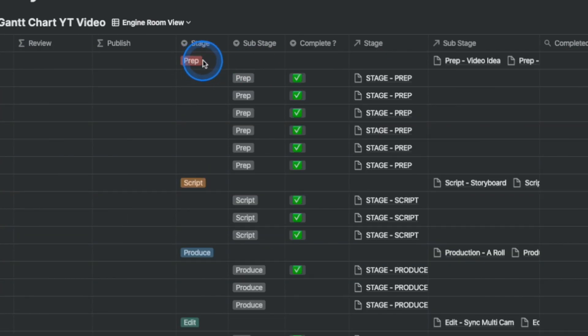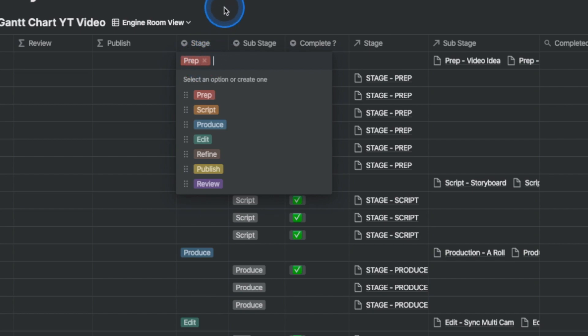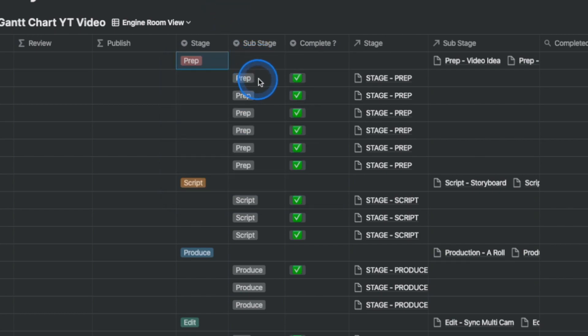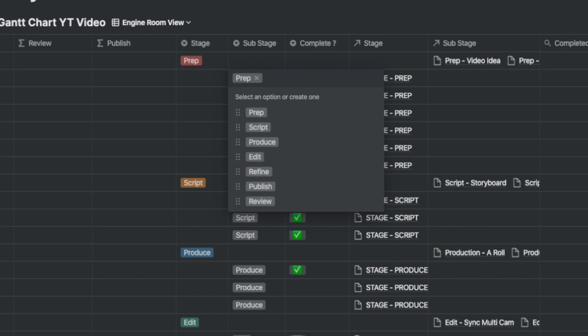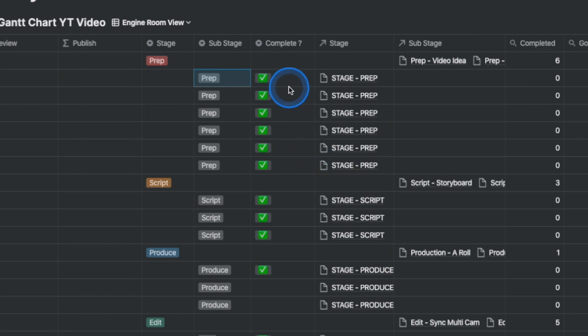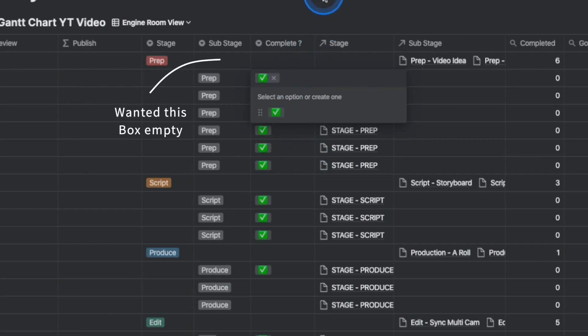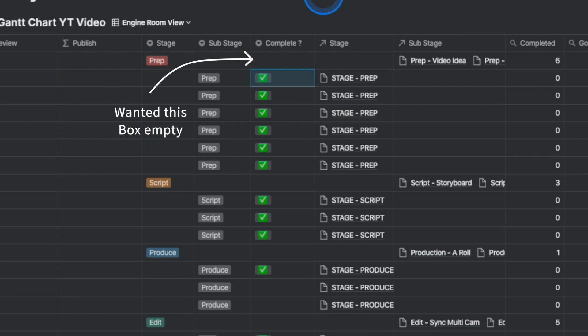I created two select property columns called Stage and Substage, so that the main task dropdown for the seven tasks was available in the Stage column. The Substage column has the same seven tasks but with a grey background for activities. The reason for separate columns was to accommodate separate filters when I want different views. This was also essential for the formula to work efficiently. When an activity is completed, I needed to tick it off, but I didn't want a tick box in the task row, and it's not possible with the checkbox property inside Notion. So I created a select view to select a tick every time I completed an activity.